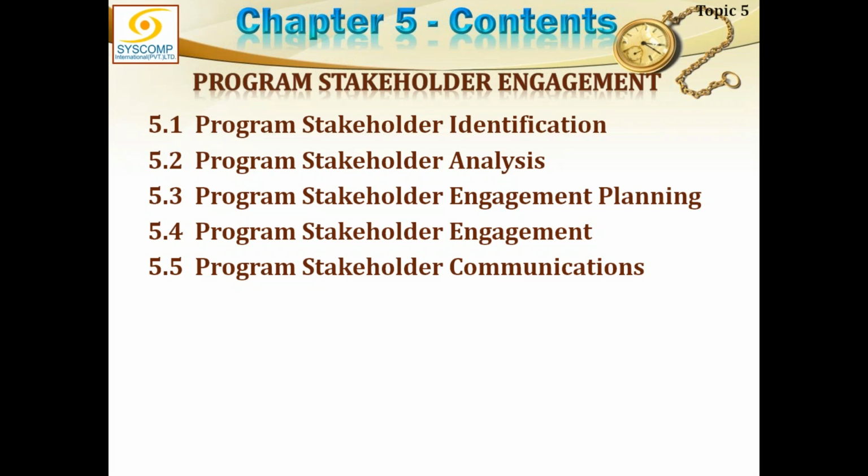But if you look at it from another angle, you will see that identification of stakeholder is very similar to risk management. You identify the risks, you identify the stakeholder, then you analyze the risk. Here also you need to assess and analyze the stakeholders, and exactly the same mechanism has to be employed here. First of all, you have to do the qualitative analysis and then the quantitative analysis. So this analysis will actually be including both of these things.